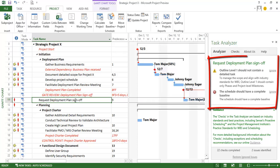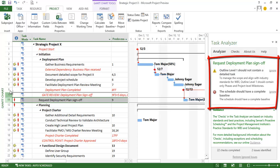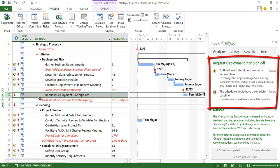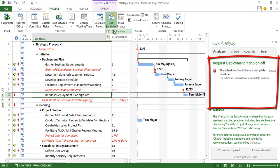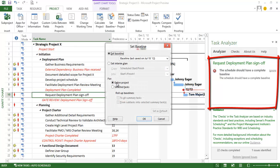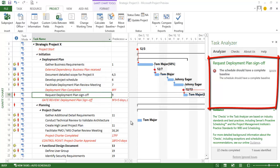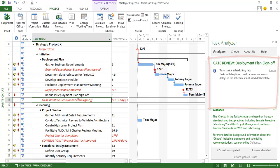Then I have a task here that I added late but I accidentally put it in the wrong place. It's sitting at outline level one which of course should not contain detailed tasks. And I need to move this task to sit right in between the deployment plan completed and the gate review done. So that's fine. And then it looks like I also didn't add it to the baseline. So let me just go ahead and add this particular task to the baseline. And now that rolls up and this particular task is in compliance as well.